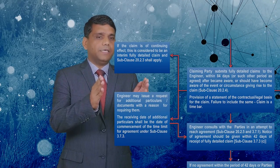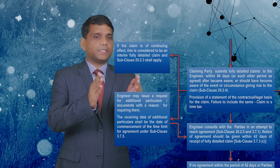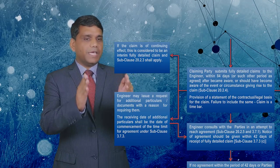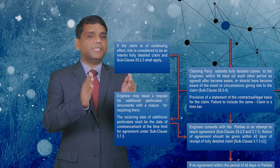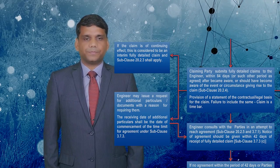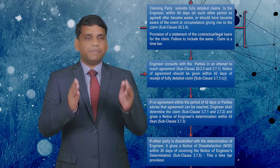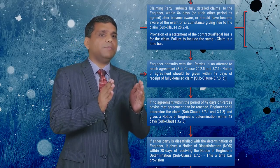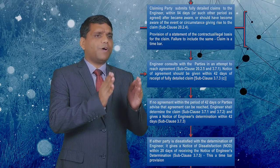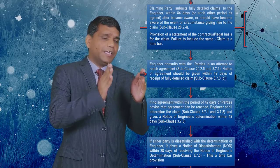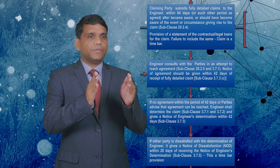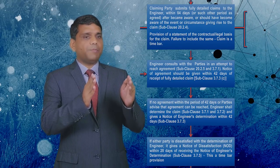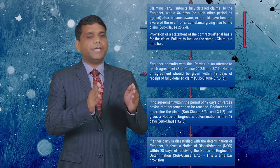Upon receiving a fully detailed claim, the engineer may issue a request for additional particulars and documents with reasons for requiring them. The receiving date of these additional particulars shall be the date of commencement of the time limit for agreement under sub-clause 3.7.3. Upon receiving the additional or fully detailed particulars, the engineer consults with the parties in an attempt to reach agreement pursuant to sub-clause 20.2.5 and 3.7.1. If agreement is reached, the engineer issues a notice of agreement. If no agreement is reached within 42 days, or parties advise that agreement cannot be reached, the engineer shall determine the claim.